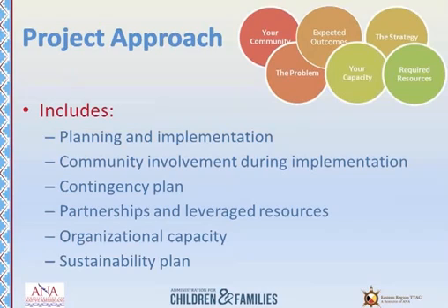Contingency planning. When you write your application, you're assuming how your project will progress. But what if something goes wrong? And believe me, something usually goes wrong. You need to identify an action plan to reduce negative impacts on the project in the event challenges come up. A good challenge to address would be staff turnover, or what to do if a key staff member was to leave in the middle of the project.